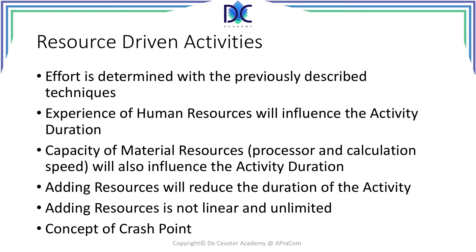Adding resources will reduce the duration of the activity, but be careful — this is not unlimited. Once we add a certain amount of people, the reduction of the duration of the activity is not linear anymore. Following the resource-driven activities and the addition of resources, we will also identify the concept of crash point, which we will look at in detail in the next session.